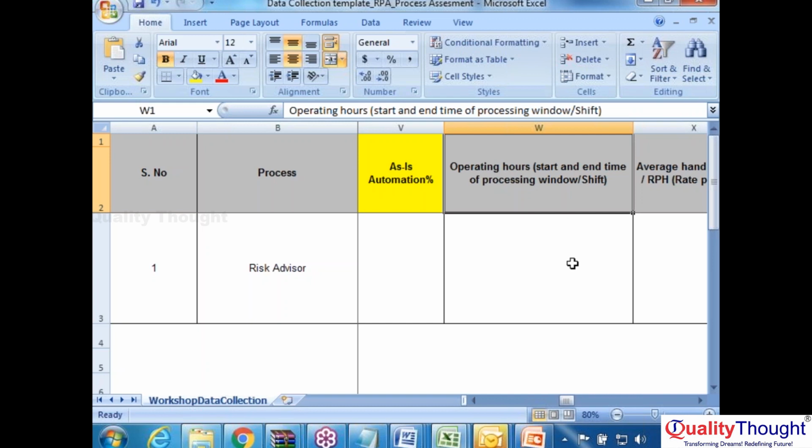That means I need 3 employees to run one process, because one employee can work for 8 hours. Then if I automate by using a bot, how many bots are required? One bot, because one bot can work for 24 hours in that general statement. One FTE can work for 8 hours, so I need 3 employees for one process. So how many bots do I need?